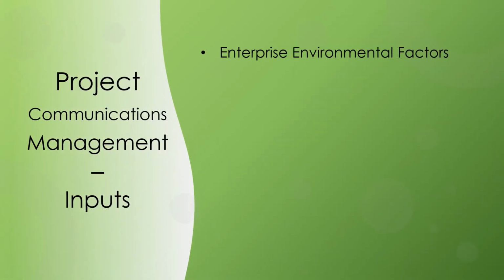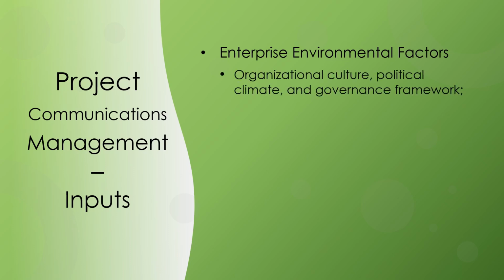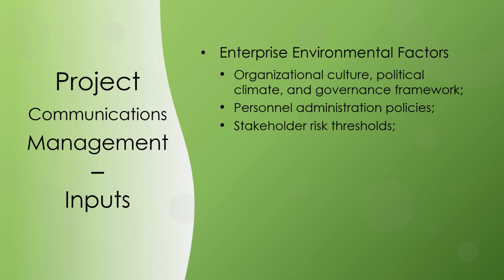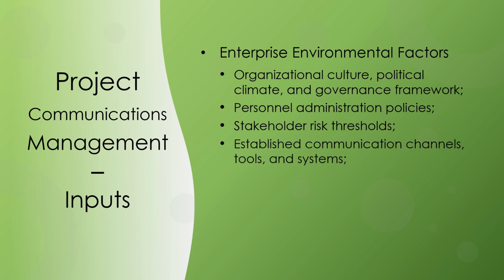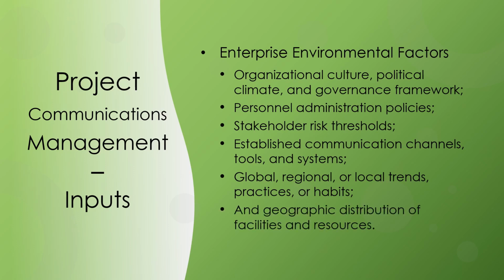The enterprise environmental factors that can influence the plan communications management process include organizational culture, political climate and governance framework, personnel administration policies, stakeholder risk thresholds, established communication channels, tools, and systems, global, regional, or local trends, practices, or habits, and geographic distribution of facilities and resources.